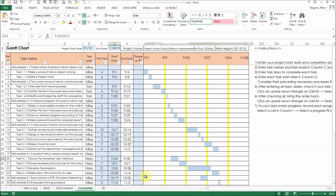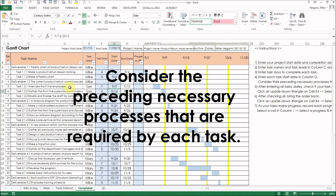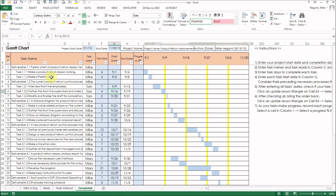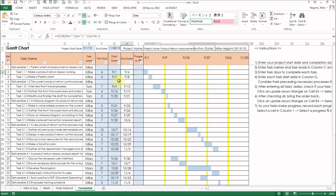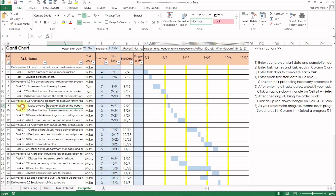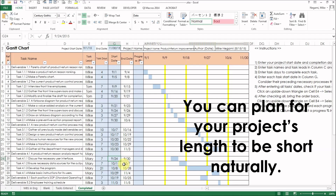There is one very important thing here. When you enter each task's start date, please do that while considering the preceding necessary processes required by each task. For example, this task's preceding necessary process is the above task — therefore, one day after the above task's end date becomes this task's start date. How about this one? Its necessary task is way before this one, so one day after that end date becomes this task's start date. By doing this, you can plan your project's length short, naturally.